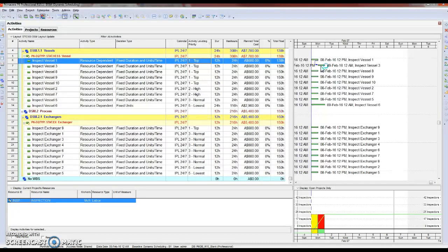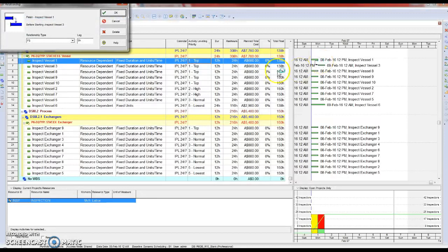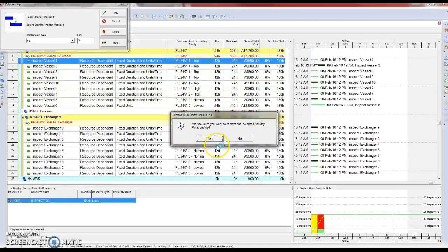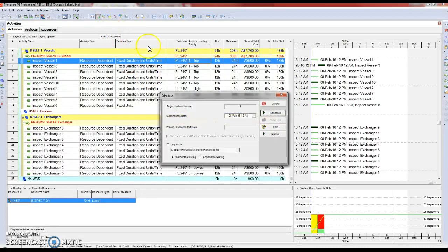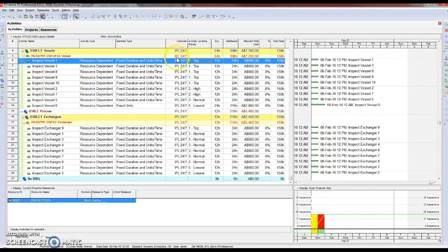In a turnaround environment, it's too dynamic to allow a scheduler or a person to build the project plan manually. So we don't want to use logic or relationships, or at least we want to minimize its use and not focus on critical path.